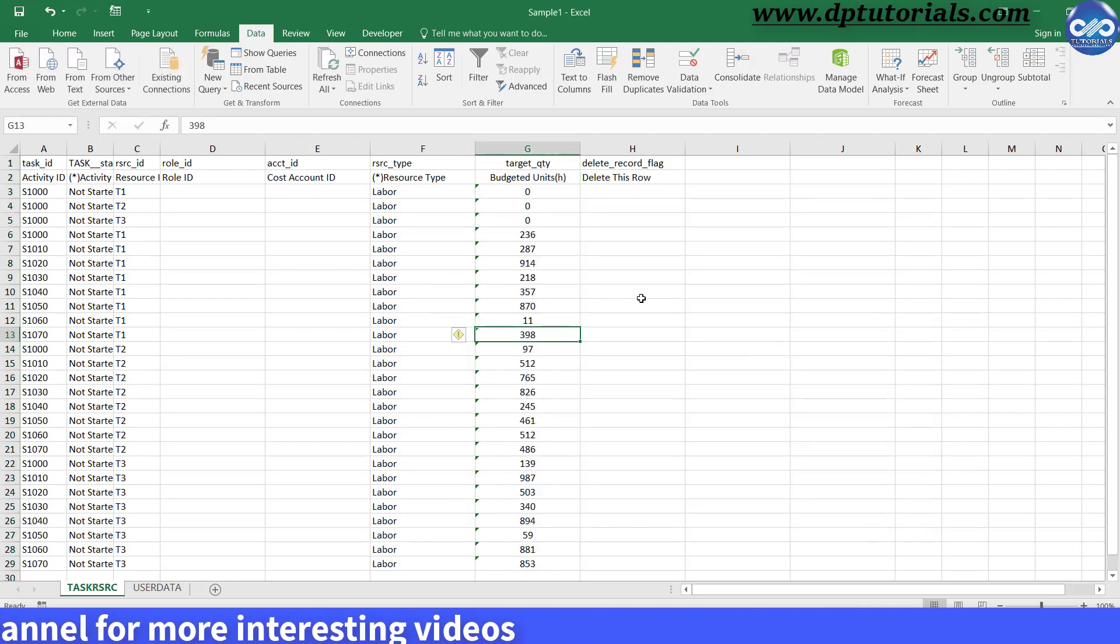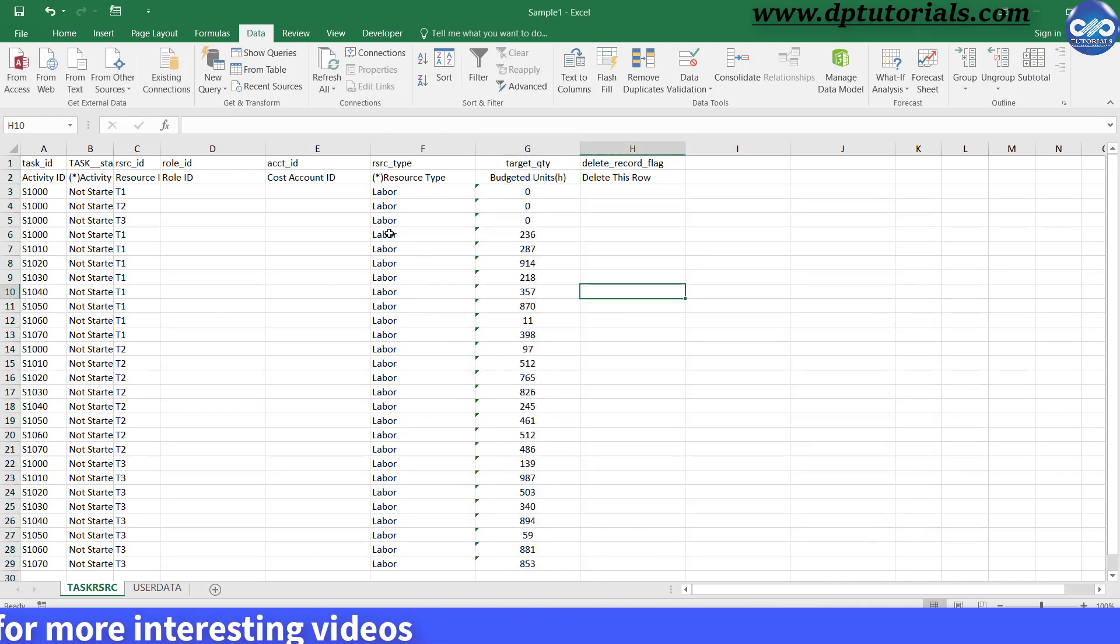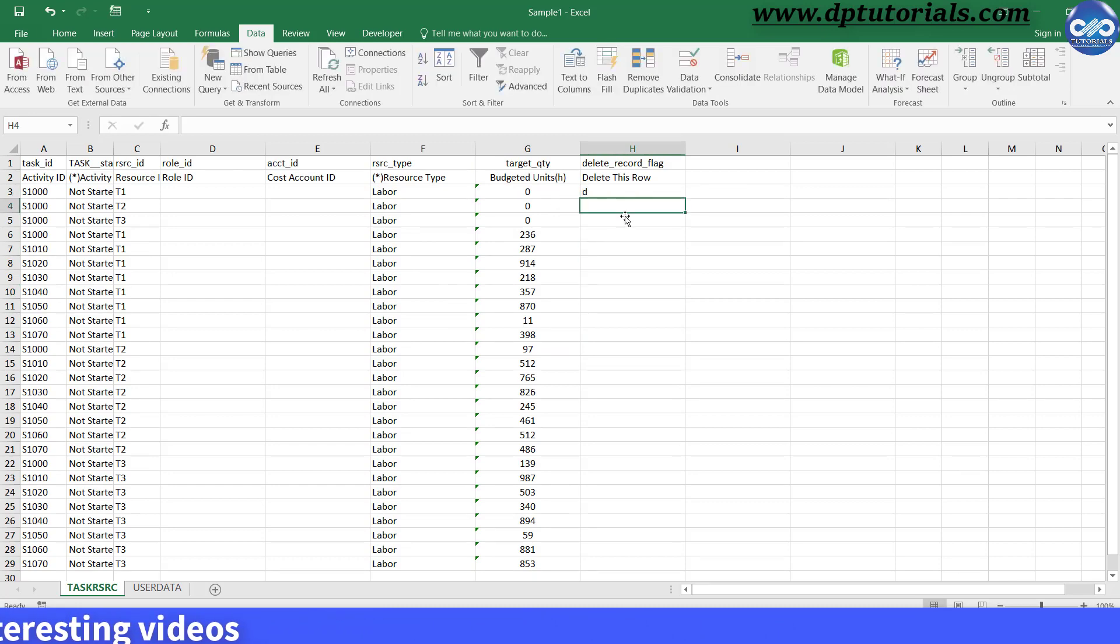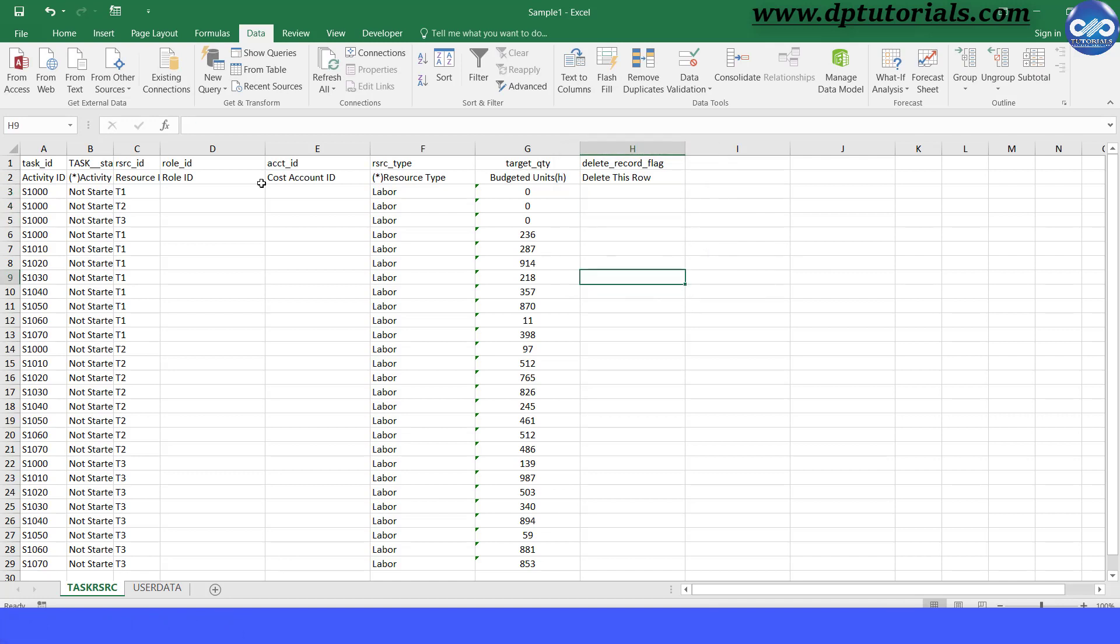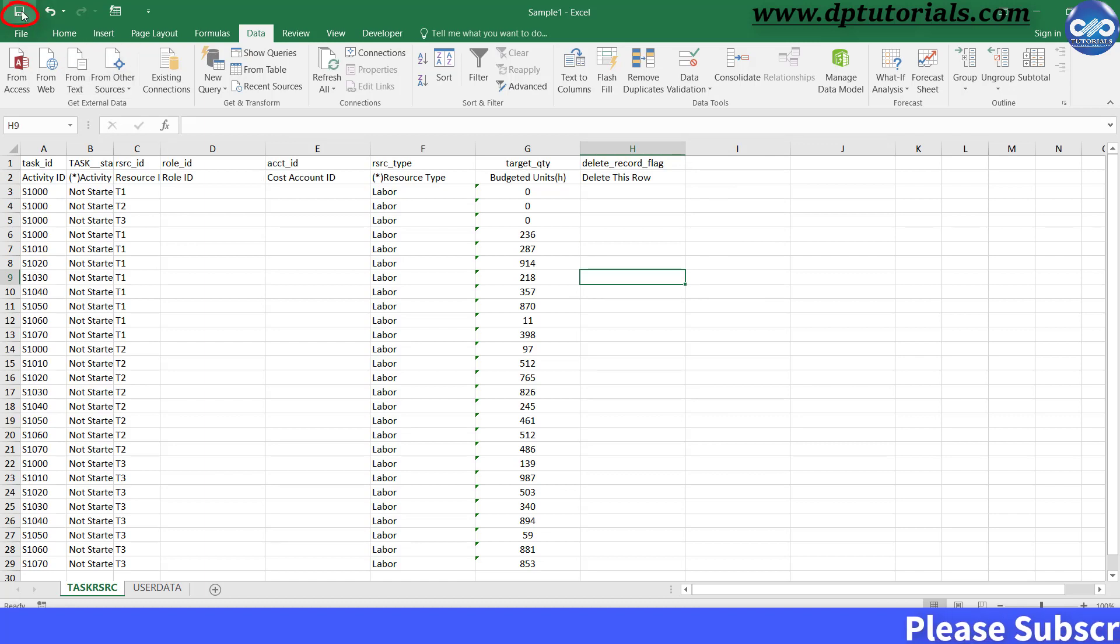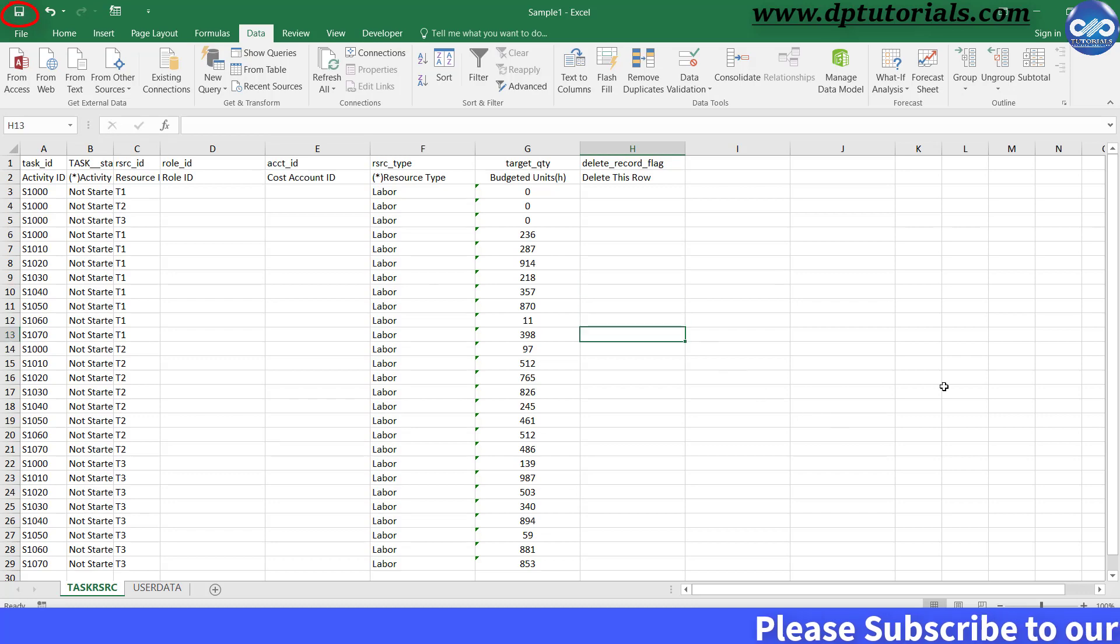One point is that you can mention as D here in this column H with the header as Delete this row. By doing this, you can delete these specific rows from Primavera by mentioning as D. Now, finally, once you are done with this Excel changes, save the Excel file and close it.